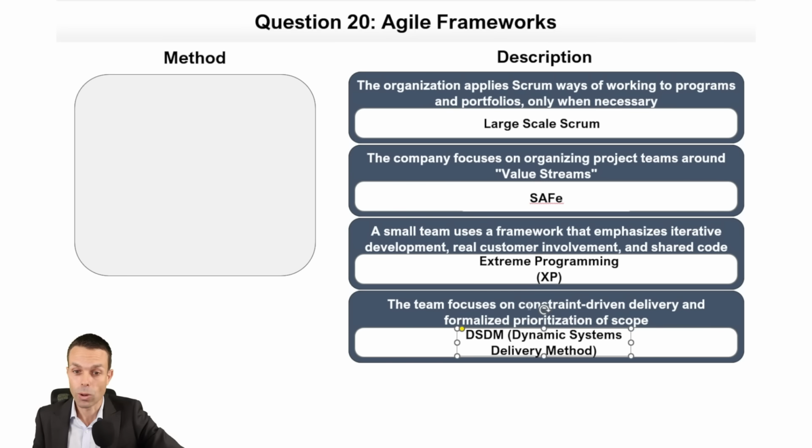And this first one looks like change control process. All right, how do we do change control on a project? What's the first thing we do? The stakeholder. Now remember, any stakeholder can raise a change. So they're going to raise a change request, and then we need to analyze the impact of the change. Is the change going to impact anything else, like our scope, our schedule, our cost, or the go live date,